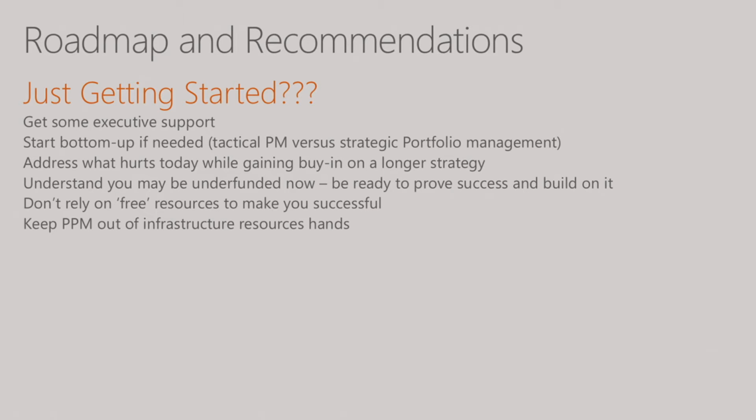One of the questions came up, I think, we've got 3,000 projects, and we want to migrate them all into Project Online. Well, the first question is, do you really need 3,000 old projects in a single instance of the tool? Because that can lead to some challenges in and of itself. So there's some strategies around building an archive database, maybe building a data warehouse where every 3 to 6 months, you take projects that are in Online and you archive them off into that database for your historical reporting, but you keep your live data in Project Online. Lots of different ways to do it.